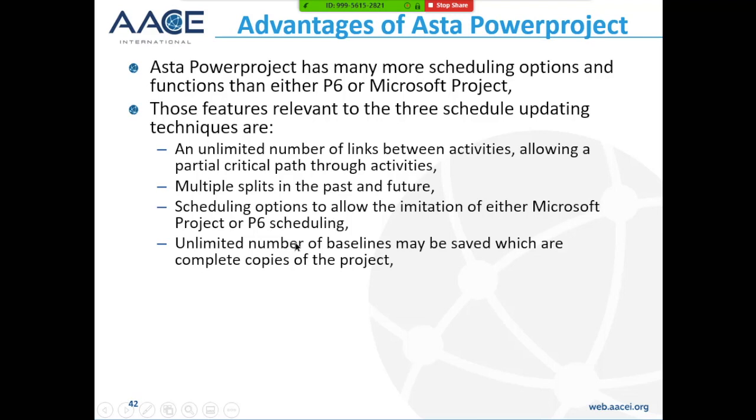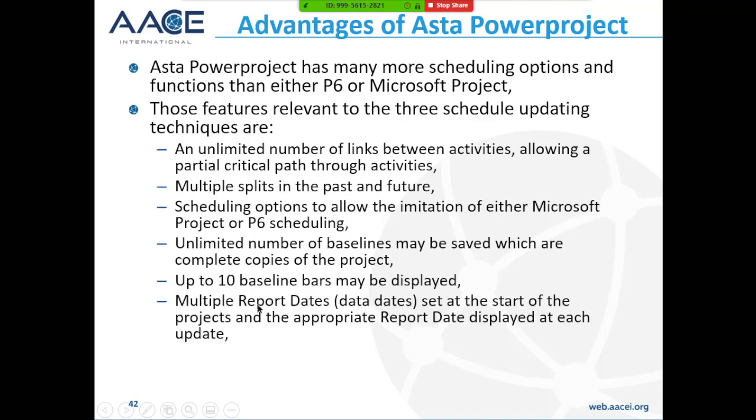It has an unlimited number of baselines which may be saved and are complete copies of the project. Up to 10 baseline bars may be displayed. It has multiple report dates, so you set up all your data dates before you start scheduling. You can turn them on or off.